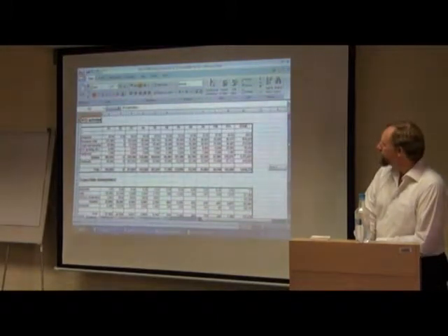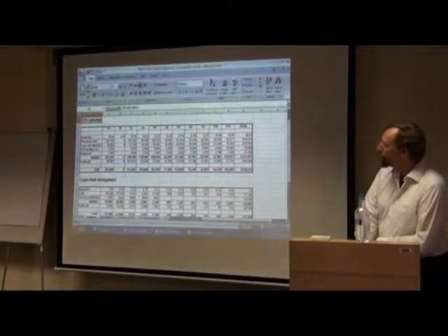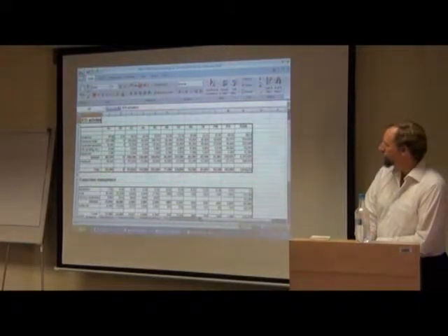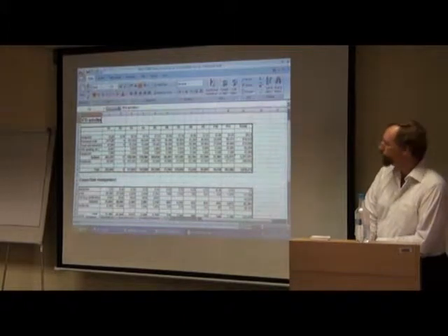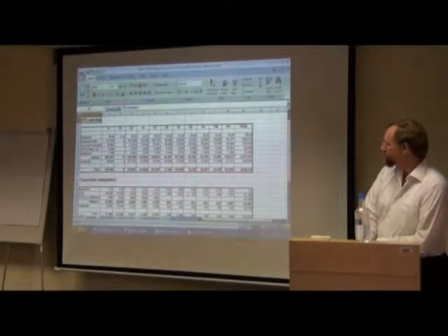You also see that on the research, the first line is manpower. That is the number of person months that each partner has. So partner 1 has 65 person months for research and 7.5 person months for management. Obviously, these are the leading partners for the management, and the rest are just follower partners for management. But the other partners actually do a lot of research, except for this one. This one is only for management and has no research.